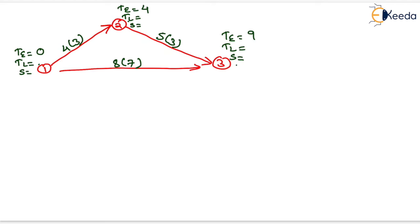TL is not given in the question, so we take it as equal to TE, which is 9 for event 3. TL for event 2 is 9 minus 5, which equals 4. TL for event 1 is the minimum of 4 minus 4 equals 0 and 9 minus 8 equals 1, so TL equals 0. Slack equals TL minus TE and is 0 for all events, so the critical path connects all events with zero slack.